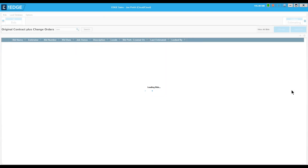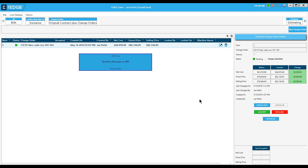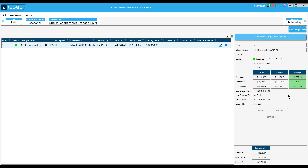I can tell by looking at this screen that the change order is pending. I can see the before amount, the current amount, and the difference in the change — the green indicates it's an additive change as opposed to a deductive change. I don't have to accept or decline right now; I can add additional change orders first. But in this case I'm going to accept it now. Once I accept, the markups and wages set in this change order become the default for future change orders.